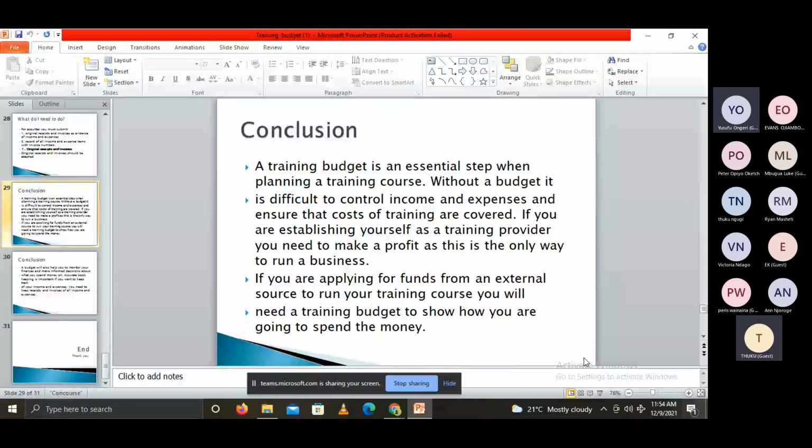The price of fuel can be affected under the following scenarios. The global market will remain constant. The global price will go high. The global market can go down. From the history, you then ask yourself, what is the probability of this happening, that happening, and that happening?